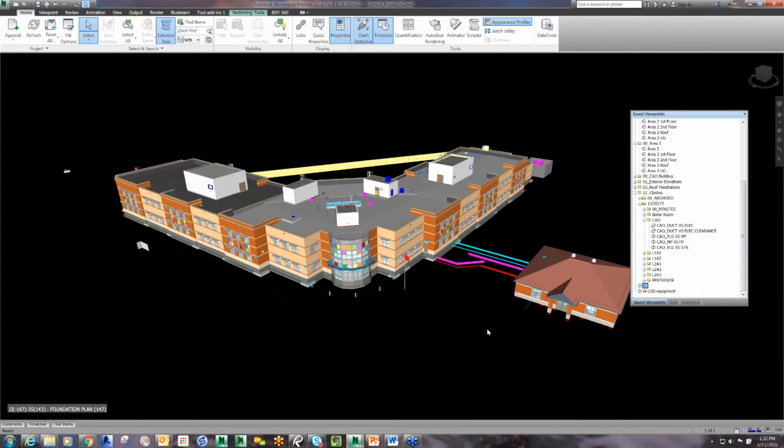And we'll have everyone agree and sign a piece of paper that says what's in that area of the building is constructible, and then we'll move on to the next area of the building. So we do typically tackle it one area at a time, unless we need to do something drastically different. We try to keep it to one section of the building at a time.